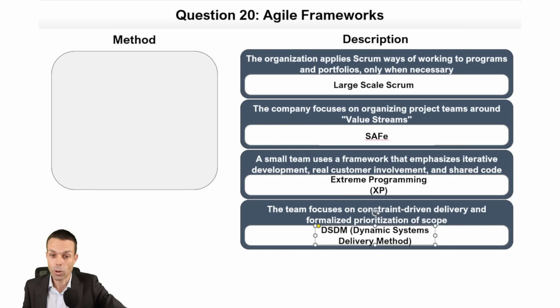any of these things? Then we need to submit the change for approval, and those approvers are in our change management plan. Most likely it's going to be our CCB, or our change control board. So that's also outlined in our change management plan. So we can come up with that at the beginning when we're planning our project. Then we're going to communicate the outcome to the stakeholders. So was it approved, was it denied, or was it deferred?